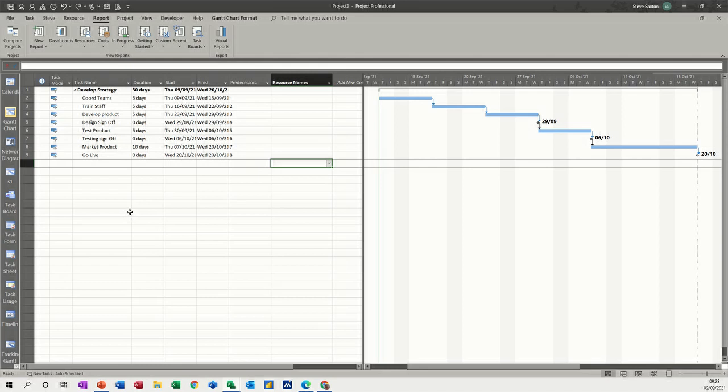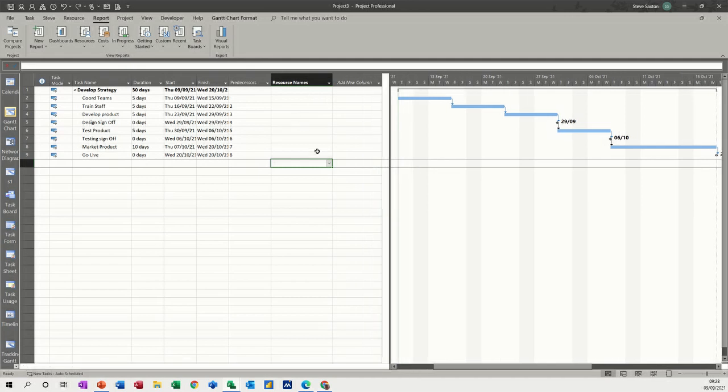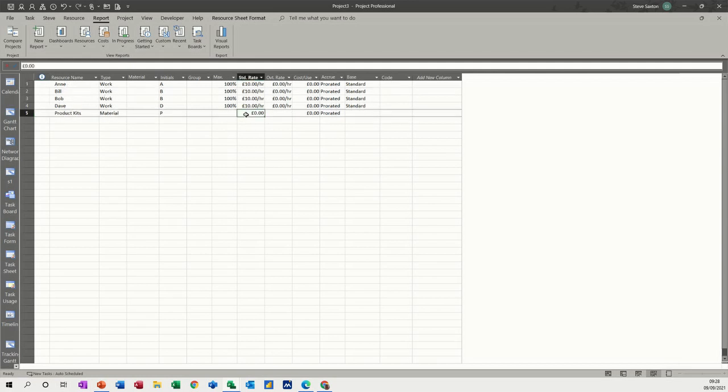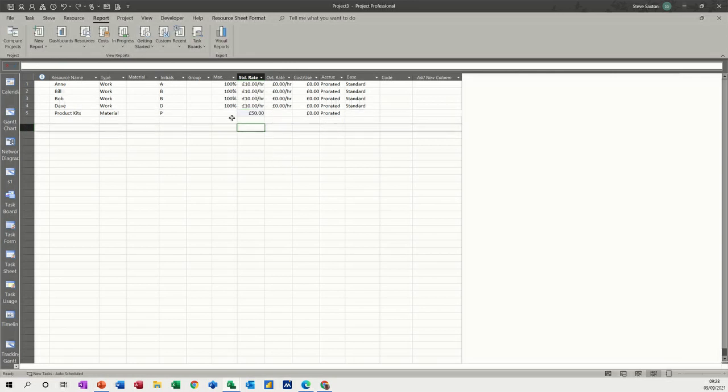First of all, I have a small project on the screen where I haven't allocated any resources, so I'm going to go to the resource sheet. These are my resources - there's four people and then this product kits material. I'm going to put that down at £50 every time you use it. Everybody else is on £10 an hour.